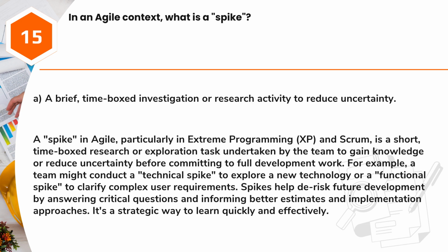Answer: A. A brief, time-boxed investigation or research activity to reduce uncertainty. A spike in Agile, particularly in extreme programming, XP, and Scrum, is a short, time-boxed research or exploration task undertaken by the team to gain knowledge or reduce uncertainty before committing to full development work.